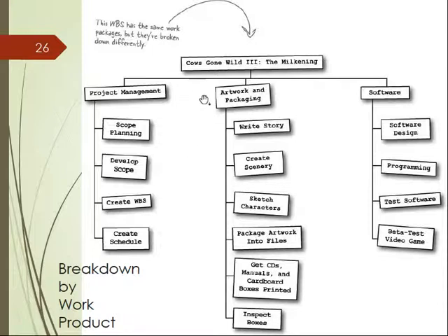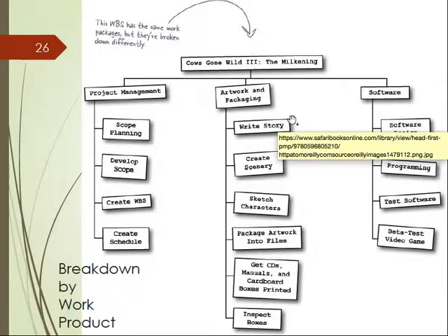Okay, so first, with a big project like this, you really don't know how many tasks there would be. Without breaking it up into small tasks or small products, you cannot estimate how much time each piece of work takes, and also you cannot assign work to someone.